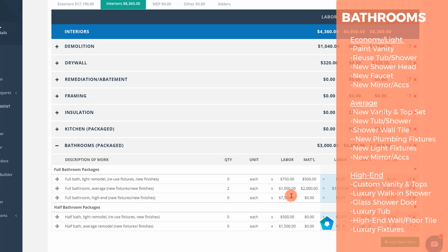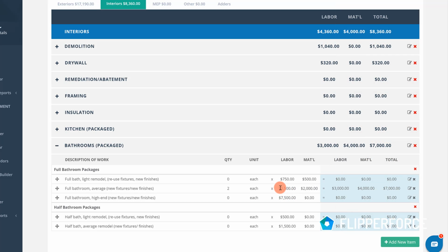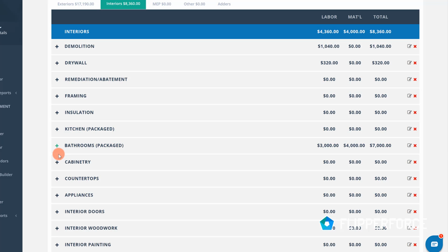It's probably going to cost you around $3,000 to $5,000 to replace a full bathroom. Now if it's a master bathroom, which is a very large bathroom, then you probably need to increase your budget on stuff like that to where maybe it's going to be more like $5,000 to $10,000 for your master bathroom. So it all kind of depends on the shape, size, scope of work of your bathrooms, but generally speaking you might be able to spend around $3,000 to $5,000 on a bathroom, and just to rehab it, install new finishes, all new fixtures, stuff like that.